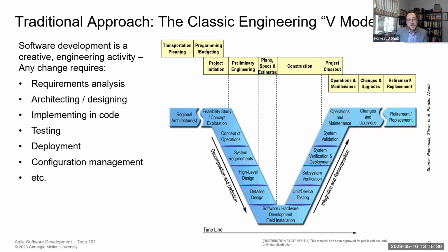And so we've tended to organize this in the past in what we call the V model. And the idea here is that you start at the top left with a very high level operational concept of what the system needs to do. And then you go through a series of successive refinements, making that more detailed. You're getting down to first high-level requirements and then very detailed requirements, and then designing the components, understanding what behavior each component has to do, implementing all these things.